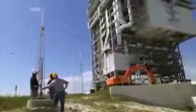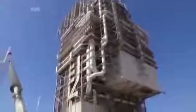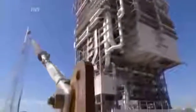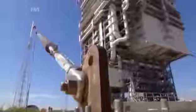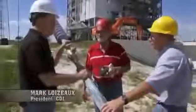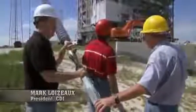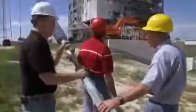Well, I look up and I see ductwork, I see pipes that are running up the outside of that corner there. If it comes down and hits and releases, it's all moving this way. Do I think that these are in jeopardy right now? Mark makes a decision. From a risk management standpoint, given the criticality of these and the consequences of damaging it, a sudden release, it's not worth the risk. No, I don't. The guy wires must be moved.